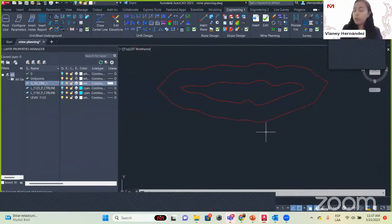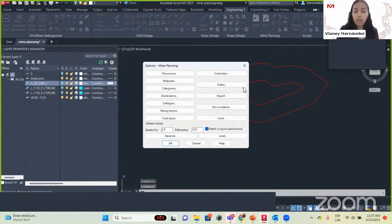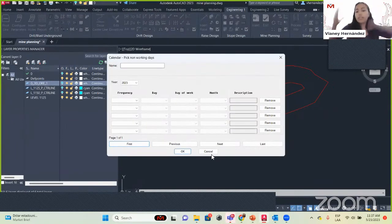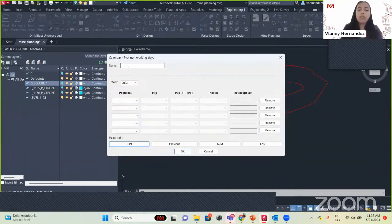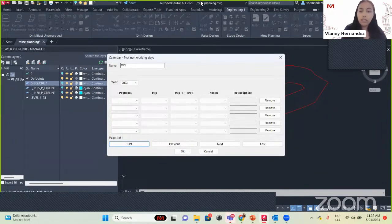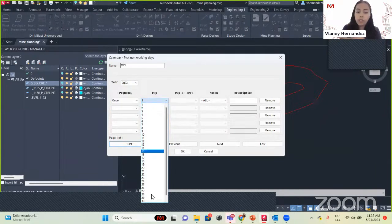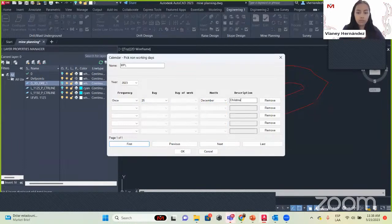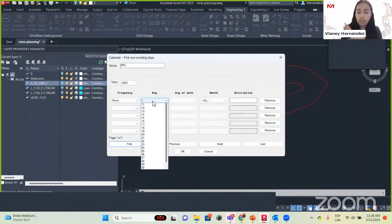We'll go to Options and see another part — the Calendars. This is important because mines need to know exactly which days they are not working. For example, we are going to call this calendar MPL (mine planning). The frequency could be once a year, weekly, or monthly. For example, we're going to say that once a year on December 25th because it's Christmas, we won't work. You can add more entries and click OK.